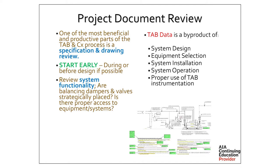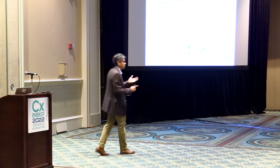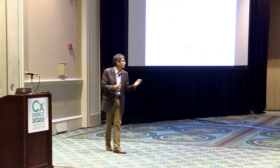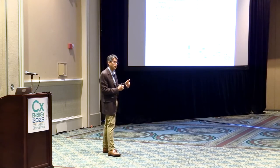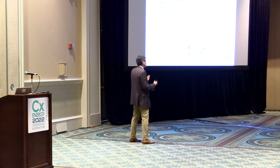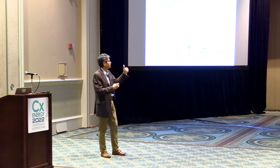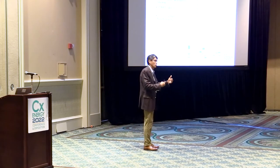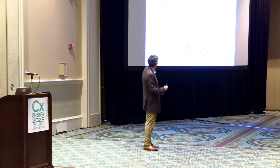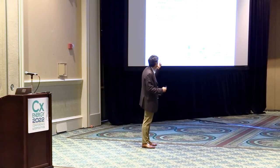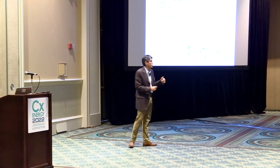One of the big things we always like to start with is a project document review — both in commissioning and the TAB process. Anything we can do on paper before it's installed in the field is going to be a big savings: monetarily, time-wise, headache-wise, and conflict-wise. If we can get a document review done as early as possible — predesign, before things get hard and fast on the drawings — we love to promote that. The data we produce is based on system design, equipment selection, system installation, system operation, and proper use of TAB instrumentation.